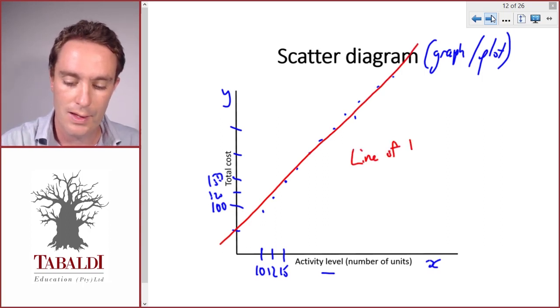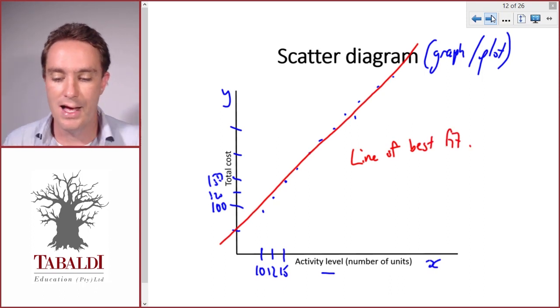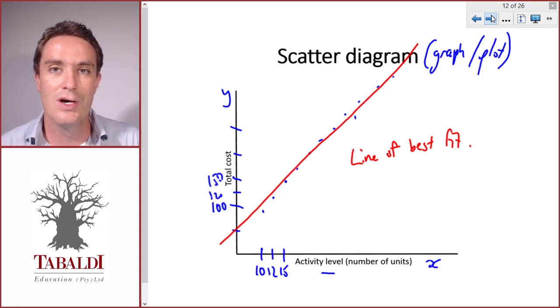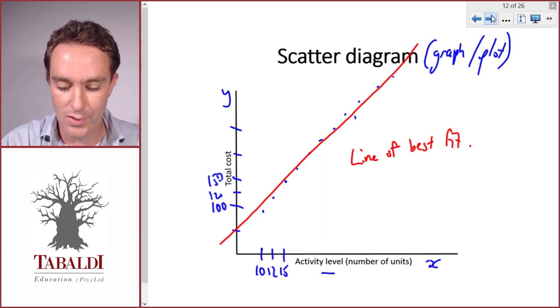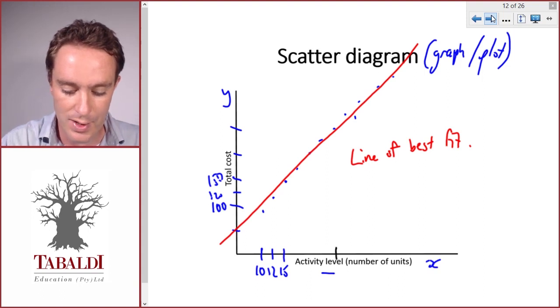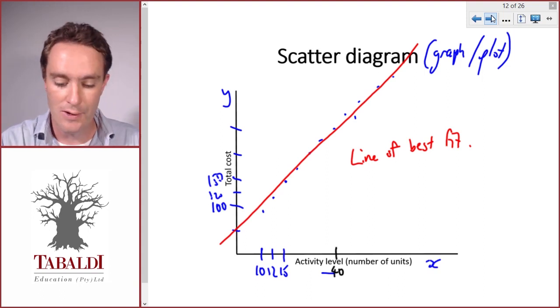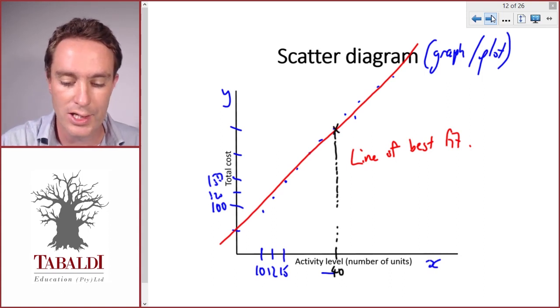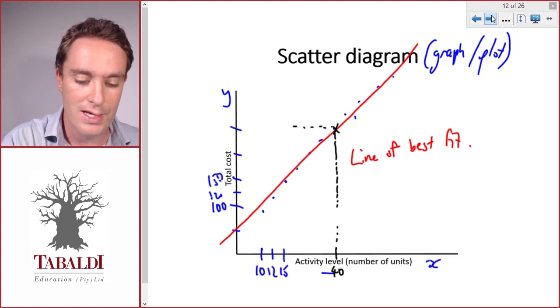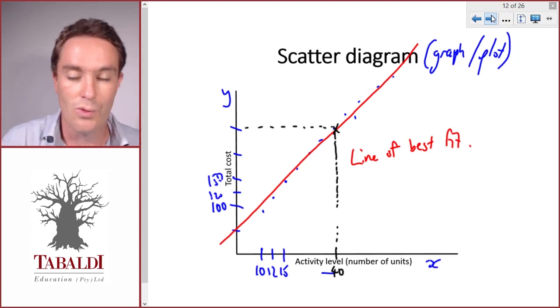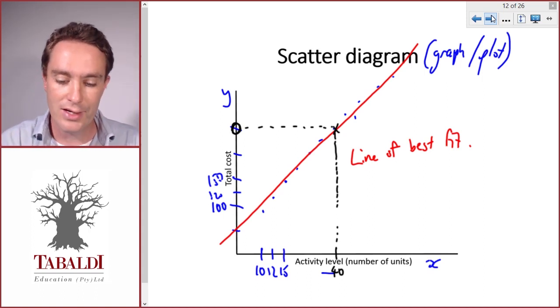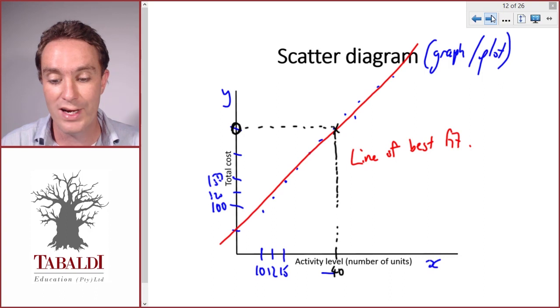So if we know in this particular month we're going to produce 40 units, we can extend it from the x-axis to our prediction line or line of best fit, and then from there extend left towards the y-axis and read off our total cost from the graph. You can see how important it is to draw very neatly and on scale, otherwise you'll get less reliable results.